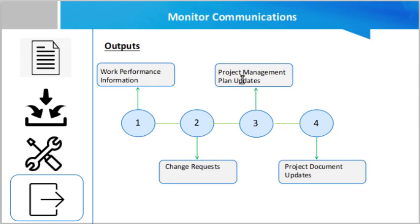Project management plan updates — any changes to the project management plan go through the organization's change control process via change request. And finally, the last output is project document updates.